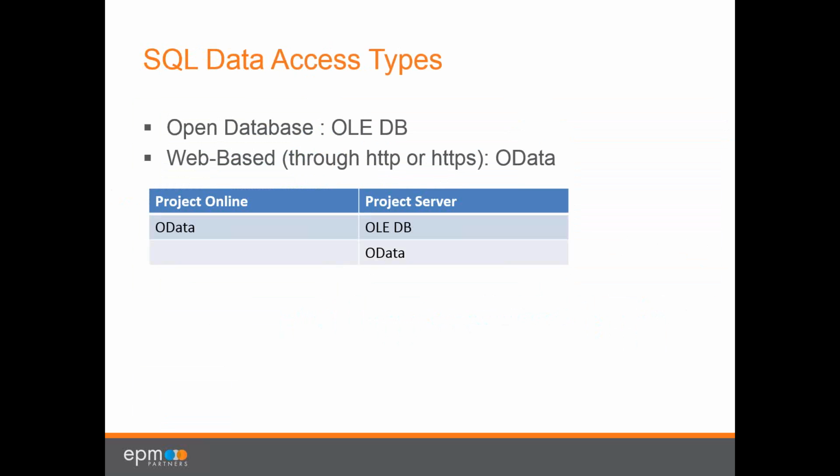So this slide here is really a summary of the differences between Project Online and Project Server reporting. This one point is the single most important difference. You cannot run OLEDB queries against the Project Online database at the back end, because you simply don't see the database, you don't touch it, you don't view it. It is only through OData, which is browsing the data through a web service through the application.